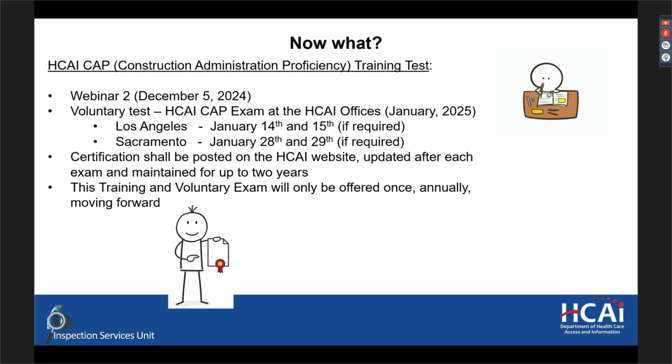Darren, do you want to add anything else? I would say the strategy of coordinating with the project team to get NMAs and material altering changes into the project is really outlined by CAN 17-153B. The 8 categories of NMAs are outlined, and the manner by which you could fold NMAs into ACDs is also outlined in there. So I would refer to that. Thank you.